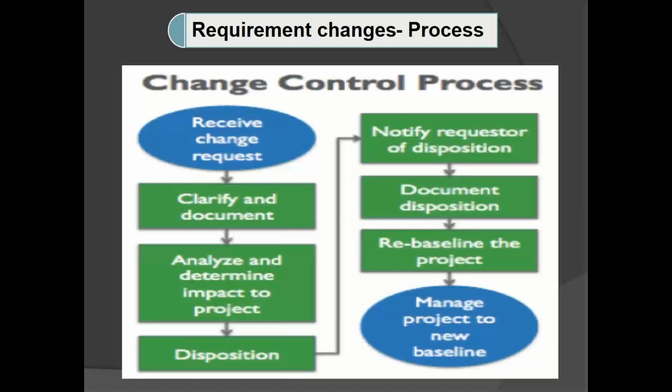Okay. Then in the next step, the BA is going to discuss with the concerned team related to this change request, and we will involve all the people who are related to this change request, and we will do the changes. In the sense, the developer starts doing changes technically. So when they start doing changes, we the BAs are going to update the RTM and SRS document. Why? Because here there are some changes happening, so we have to maintain version control. So we are going to update all related documents.